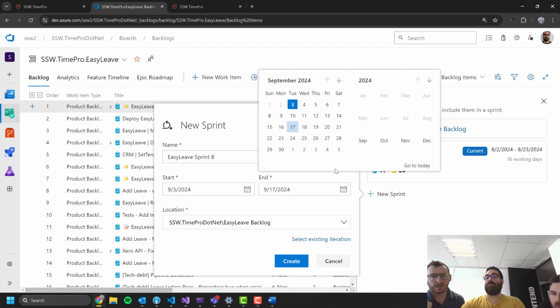Do you have any leave coming up this week or the week after? Nope. Okay, cool. The reason I'm asking is you want at least 5-10 man days ideally, right? Today is pretty much gone, so you've got Wednesday, Thursday, Friday. That's 3 man days times 2, 6 man days. Next week you're off, so that's 5 days. So 11 man days. So you can make it Monday 16th. That's 10ish. Coming back on Tuesday.